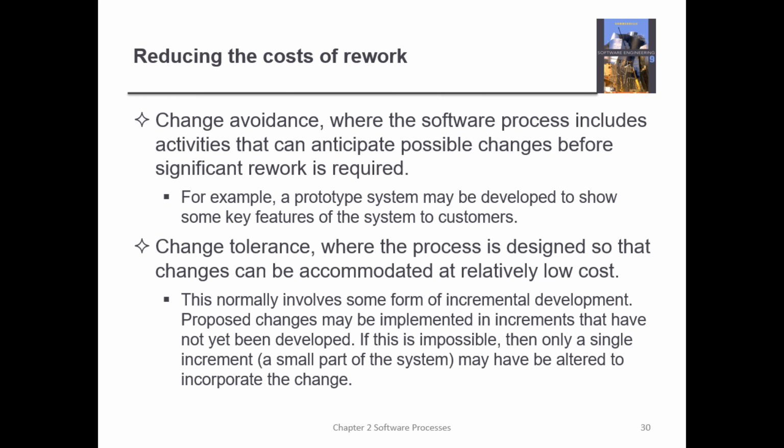Then another way to reduce the costs of rework, of reanalyzing the system, is what we call change tolerance. Here, in this process, the changes can be accommodated at a relatively low cost. How? This can be done when you have adopted the incremental development model. So the proposed changes may be implemented as increments, as new versions.